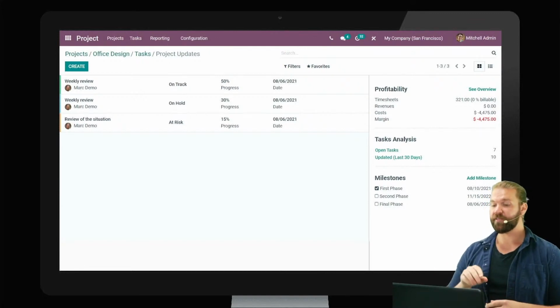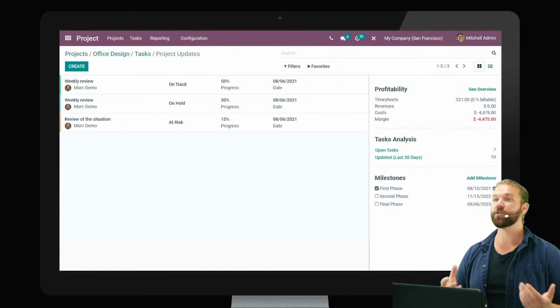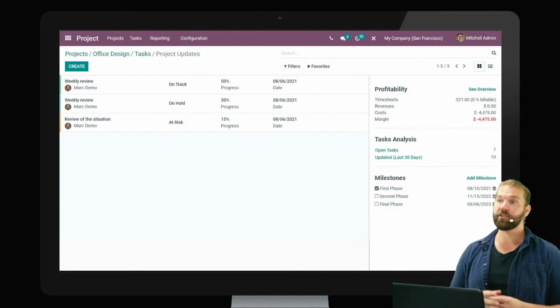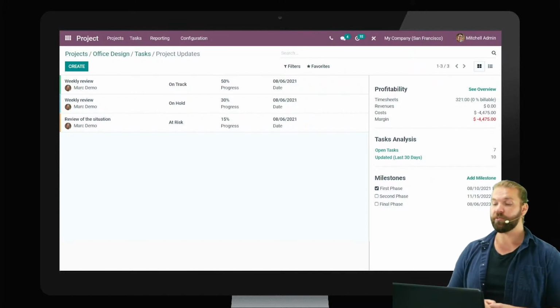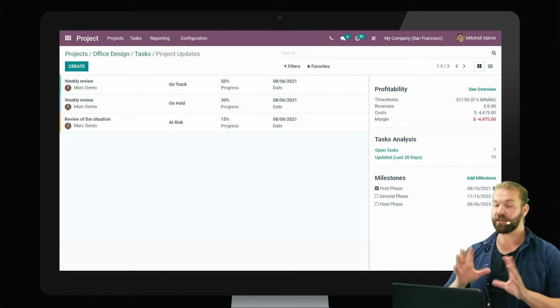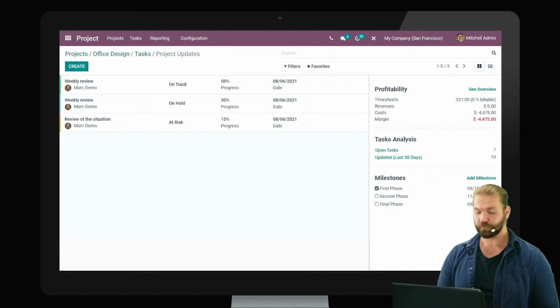And then from there, you specify the percentage progress of, okay, how close are we to being completed? And then further from there, you can even add your own notes. It will pull information from tasks, so you get a live update from there as well, just a quick summary. And then, of course, as a project manager, project lead, I want to note down any information that's pertinent that my management might need to know. So this whole view is great for upper management, anyone in the company to see, okay, I need a quick snapshot, I'm busy, I'm on the go, so what's going on here? Are things going well? We'll see more of this, of course, in the demo, but this is one of the biggest changes we have in version 15.